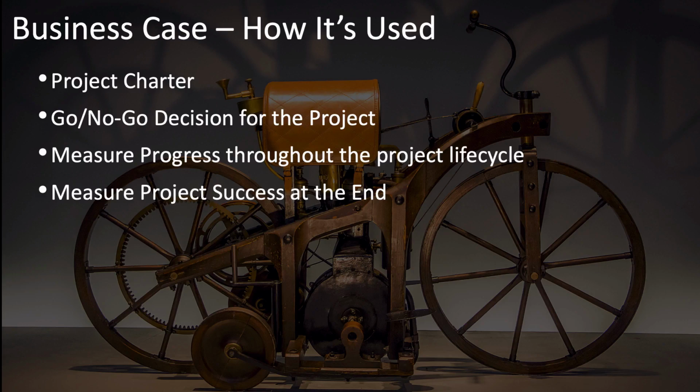He's the one that's accountable. But it's also up to the project manager to make sure that the sponsor is doing it, such as by scheduling regular reviews at key points during the project, such as when approving the project charter, at the completion of each phase of a multi-phase project, or at regularly scheduled intervals, such as monthly or quarterly reviews, depending on the project. The business case is also used at the end of the project as well as beyond. Along with the benefits management plan, it's used to determine whether the project has delivered the benefits it was meant to, and whether those benefits have been sustained as planned.